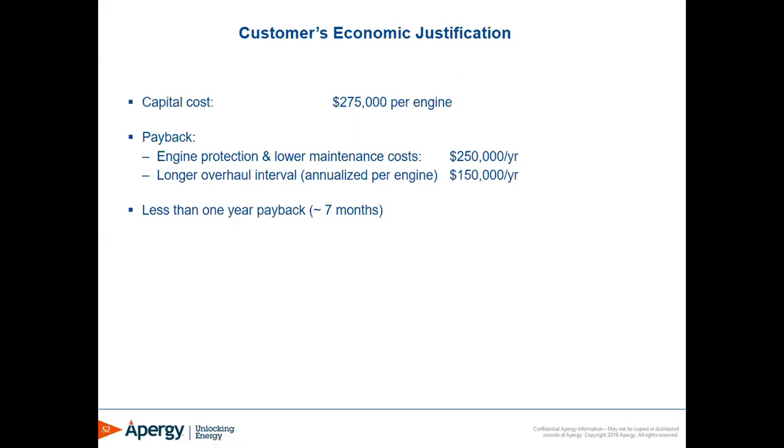Important to note that the capital cost includes the entire project. So that includes the Windrock system, the hardware from Windrock, as well as Windrock's installation part of it, and the subcontractor that installed junction boxes, installed the cabinets, ran the wires, all of that.